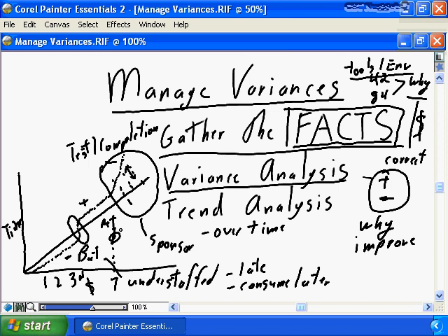And speaking of being on budget, a term that I've picked up that I like, our project is on budget-ish. I don't think there's ever a situation where a project is absolutely on budget to the penny. So therefore, when I say I'm on budget, I'm saying I'm on budget-ish. It's around about the budget. It's within the tolerance factor of what my project sponsor, what my project management plan says. I'm on budget if I'm within 5% of budget, or I'm on budget if I'm within 8% or 10%, or whatever your budget tolerance for the project is going to be. So at month 7, you can write another status report that says we're on budget-ish.